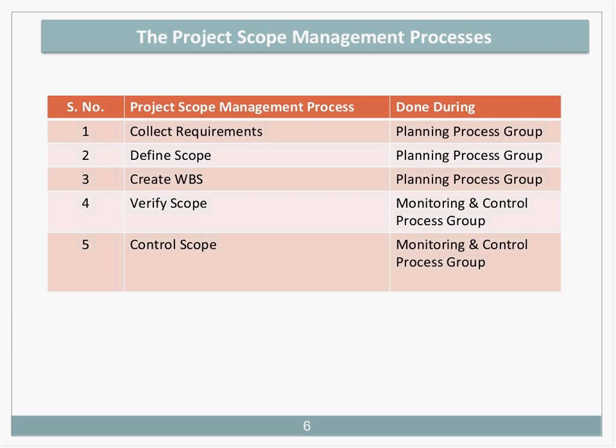Project scope management consists of those five processes: collecting requirements, identifying the stakeholders' expectations in order to satisfy the objectives of the project, and documenting them in the requirements documentation. Define scope is doing a detailed description of the project and product and documenting it in the project scope statement. Define what is included and what is excluded.